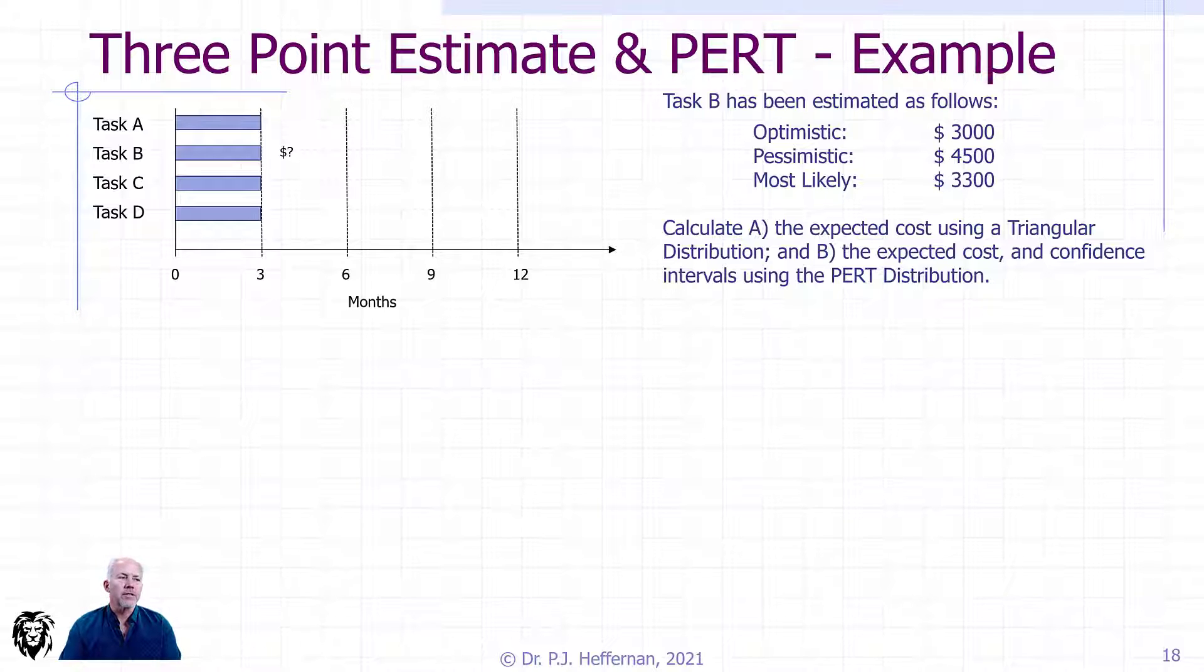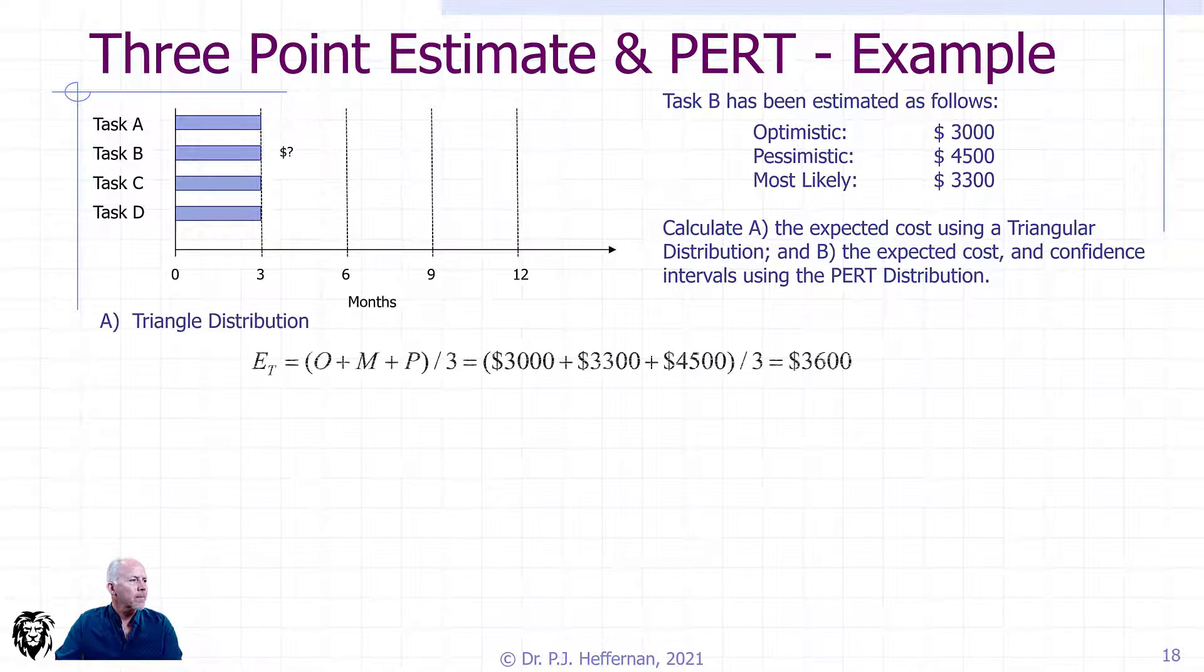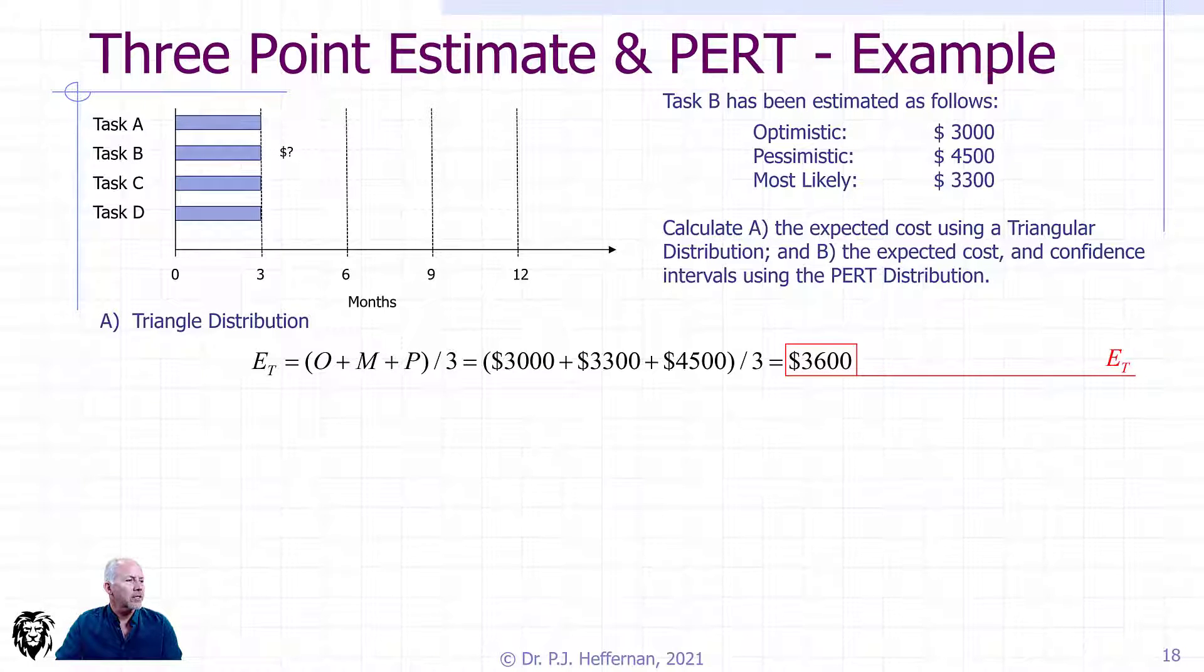What we want to do is use the triangular distribution to estimate what we should be using, and then also use the PERT distribution to do the same thing. Using our triangle distribution, we see it's an unweighted formula. Optimistic plus our most likely plus our pessimistic, add them together, take the mean by dividing by three. And we get an estimate for our task B cost of $3,600 using the triangle method.